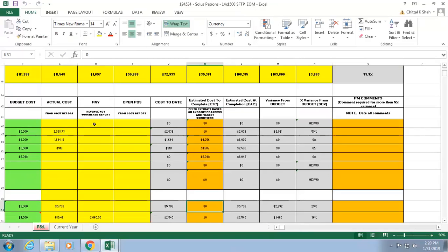So the reason R&D is important is we do point-in-time revenue recognition. So this is all cost, right? We all talked about cost so far. You're putting cost, you're showing cost, you're saying how much more I'm going to need. Let's talk about the revenue. So as a business, we want to say how much revenue we have made every month. The way revenue is calculated for point-in-time type of project, which most of our projects are, is every time we add value, we want to recognize revenue on it.